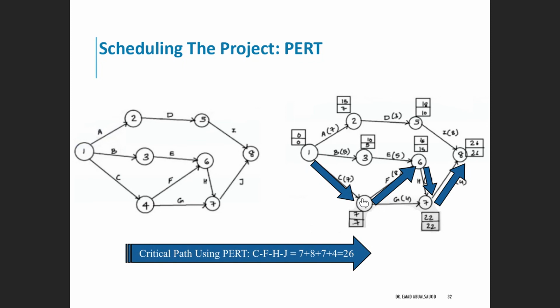Sometimes it could be more than one route. يعني ممكن يكون هذه الراوت وهذه الراوت برضو تكون أنا أتكلم في أحداث حقيقية ممكن يكون عندك أكثر من نود لكن always the critical path in most of the project there is one that has all the values are equal, so always you think in finding those values by applying the forward path and the backward path, and it will appear to you automatically. As long you apply it correct, you have to pay attention to nodes like this one here.